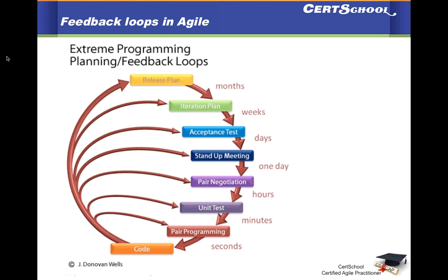My suggestion to whoever has not done pair programming before, or hasn't seen it done in their teams, is to experiment with it. Budget for pair programming when you're building your project team if you're doing XP. See how it works for one release. If your release is a quarterly release, see how it works for 3 or 4 months. That would be my suggestion.